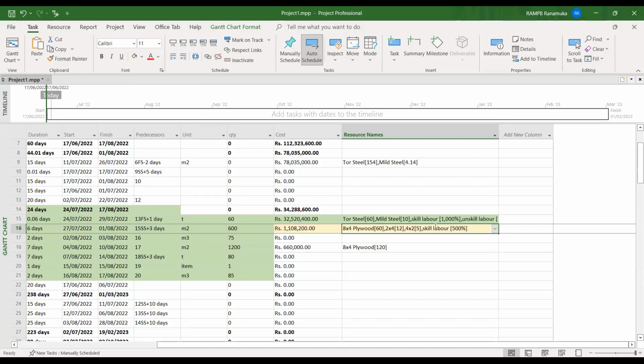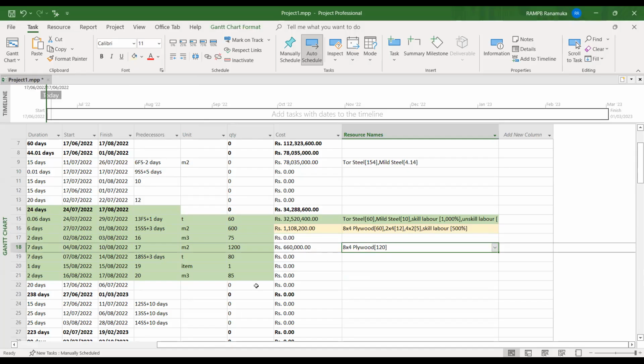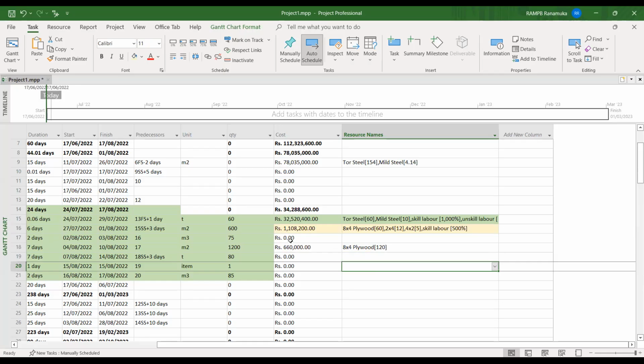So in some of the items you prepared in the Excel, we couldn't copy and paste. For these items, the labor and other things didn't come, because in the Excel we put the labor as 5, not as a percentage. So whatever we do in the MS Project manner, we have to do the calculation in this Excel. Otherwise the items will not come to this place.